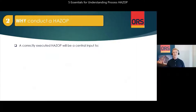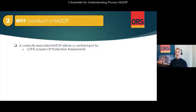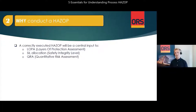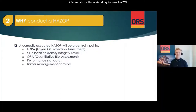Ensure that the application of safety barriers is such that the hazards are properly eliminated or mitigated. We also conduct a HAZOP to identify deviations from related standards and project requirements and identify design improvements. In addition, a correctly executed HAZOP will be a central input to LOPA — layers of protection assessment — SIL allocation to establish the safety integrity level, QRAs — quantitative risk assessments — performance standards, barrier management activities, and maintenance strategies.